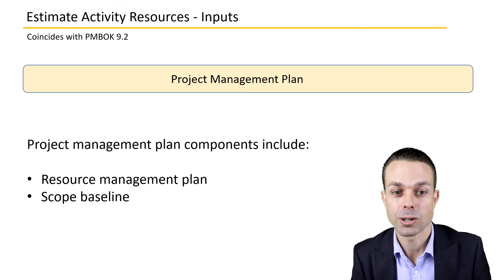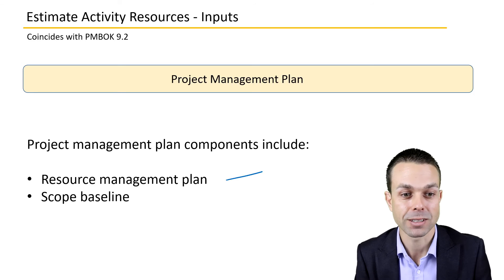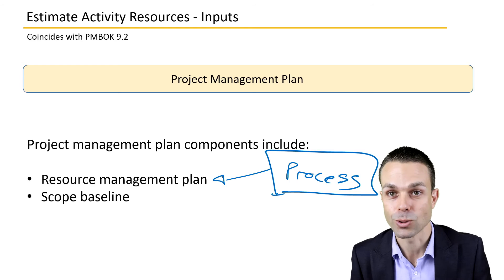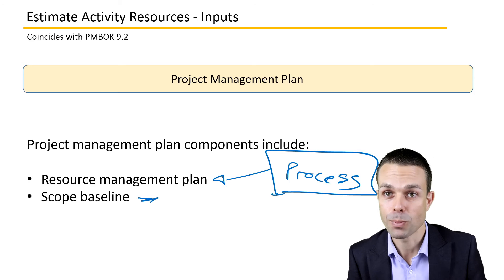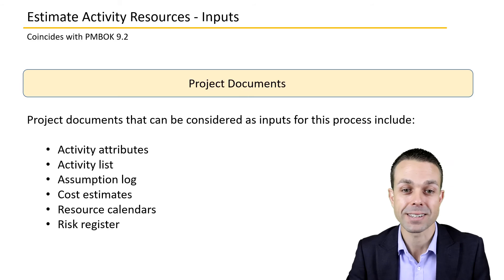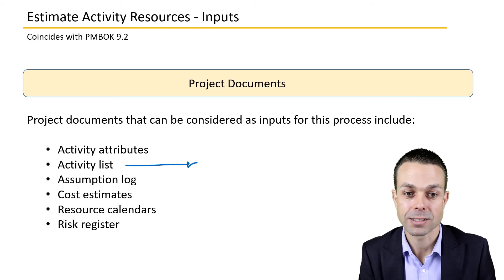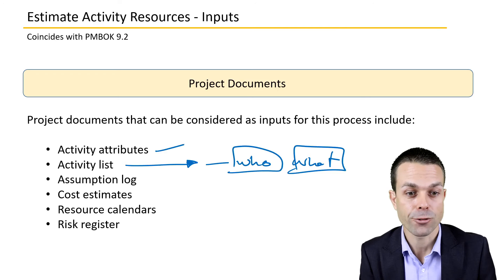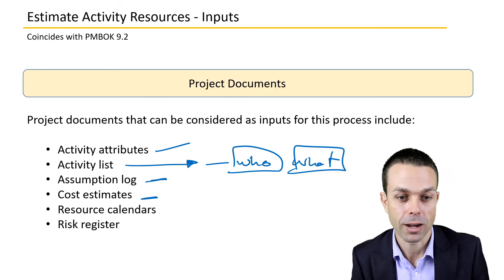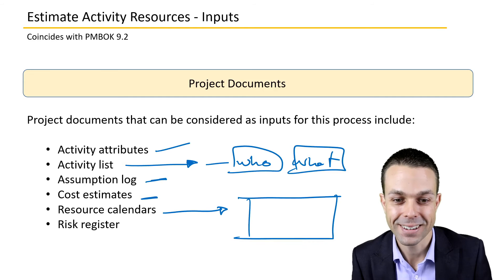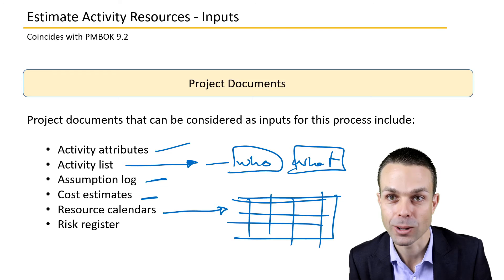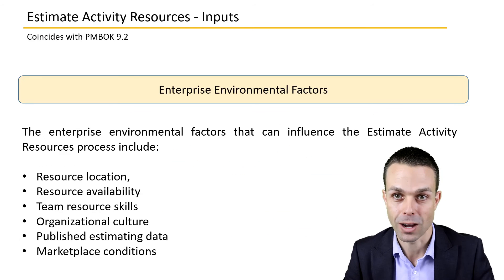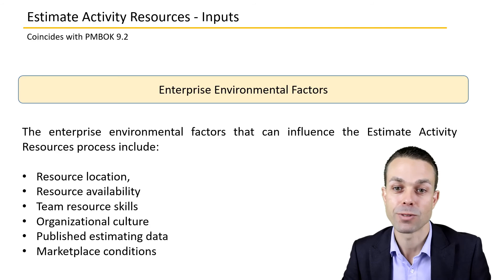Key inputs for estimate activity resources include the project management plan — most commonly the resource management plan, which describes how we gather, manage, and control agreed-upon resources — and the scope baseline, so we know what we're delivering. Project documents used as inputs include the activity list, activity attributes, the assumptions log, any cost estimates made so far, resource calendars showing who is available and when, and the risk register for any raised or emerging risks.